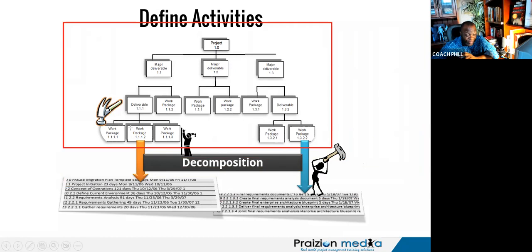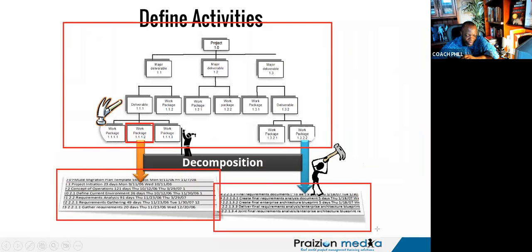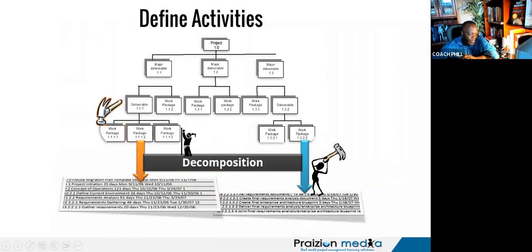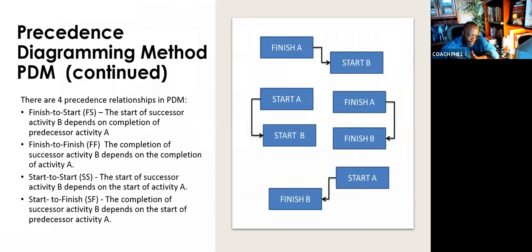The work breakdown structure is a totally different nomenclature than a schedule. The idea is that you go down to the lowest level of the WBS, the work package, and you break those open into tasks. And that's what we have here. Now, these tasks need to be scheduled, and they need to be scheduled with a consciousness of relationship types. And here come the relationship types you see in Microsoft Project.